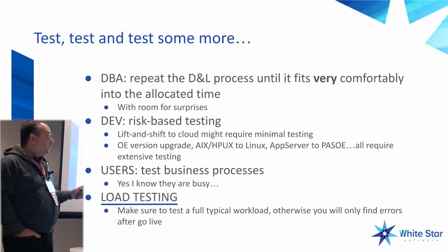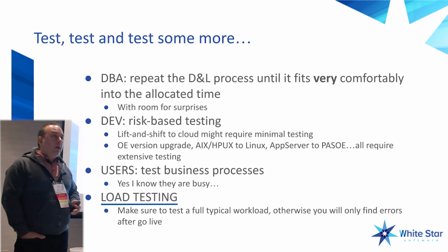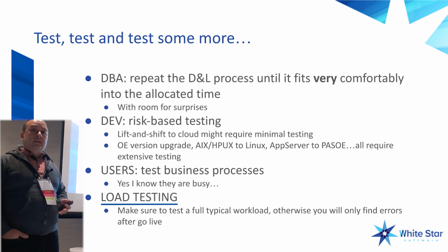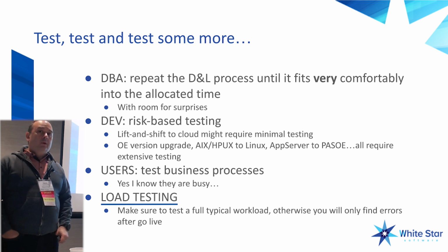We had a client who brought in 400 warehouse employees on a Sunday morning to load test their new system. They were migrating hardware and they were upgrading the application. The application was Infor SXE, which is a warehouse management application. They brought 400 employees in on a Sunday morning and the test failed. Everything was great, but when we put 400 users on, the system did not respond.